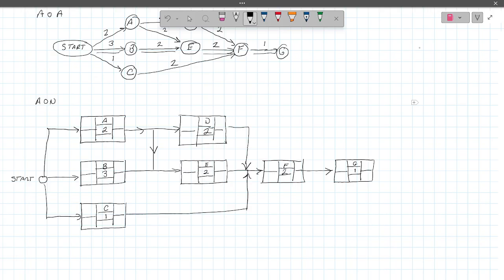Okay. So early start. So let's remember these boxes. I'm going to put an ES outside of this. Late start. Early finish. Late finish. Okay. And we're going to pass forward and we're going to the end. The cool bit is when we get to the end, the last two boxes of early finish, late finish have to be what? Exact same number. You cannot end a project and have a wishy-washy end. You got to declare we're done.